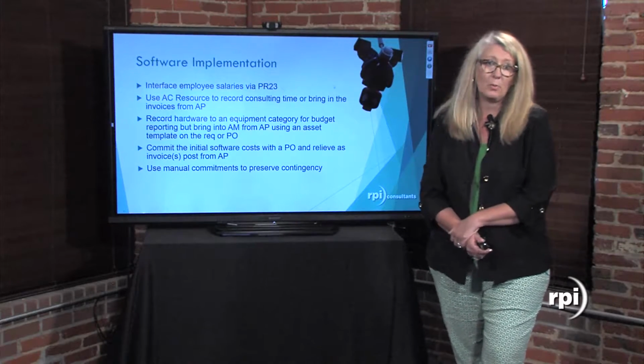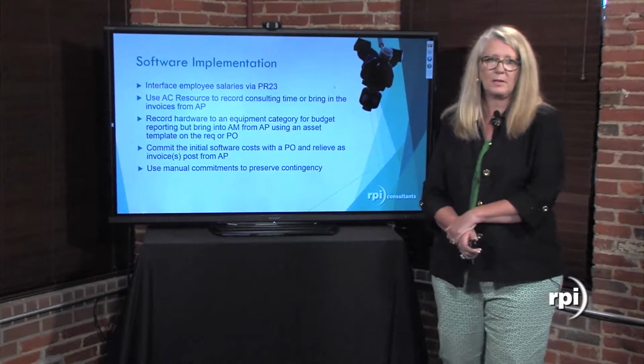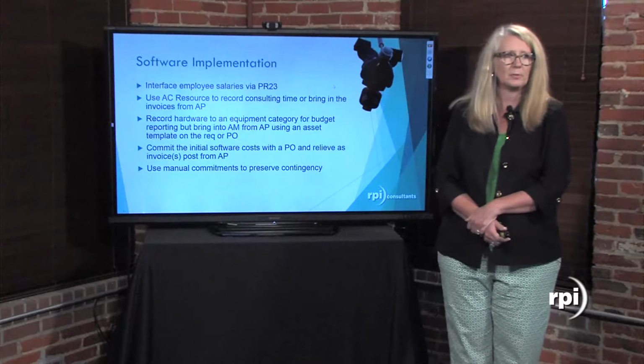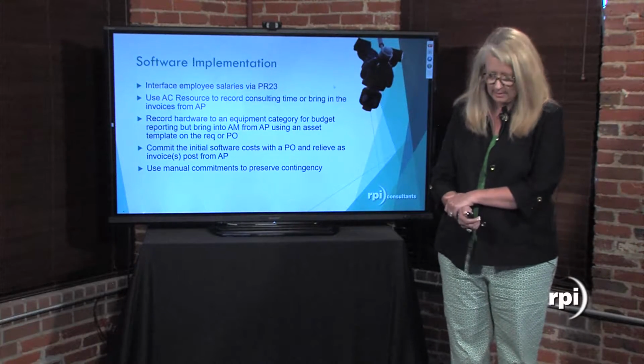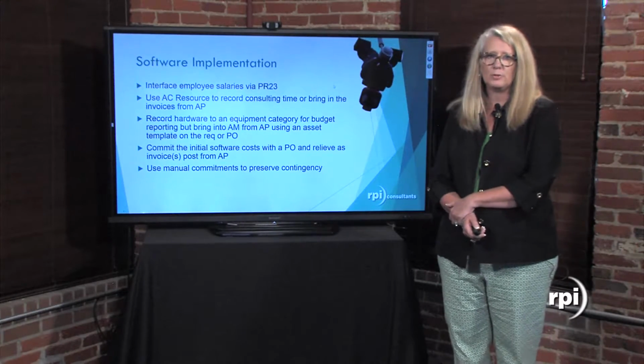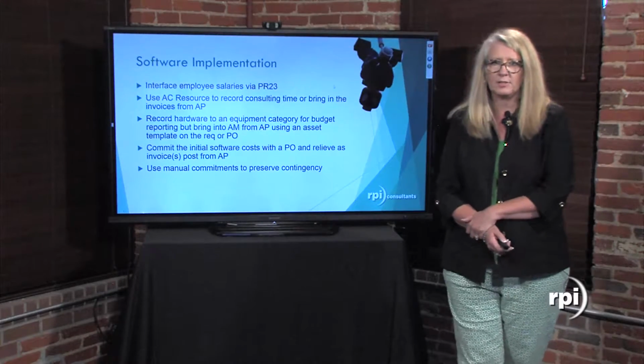And we should always commit the initial software costs with a PO and relieve as invoices are posted from AP. And we always recommend you use manual commitments to preserve contingency.